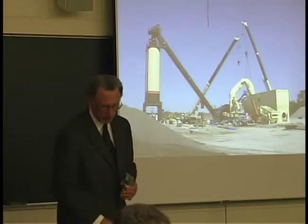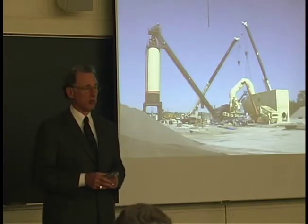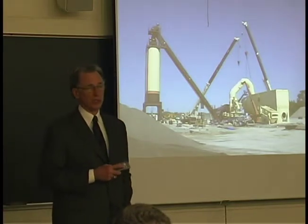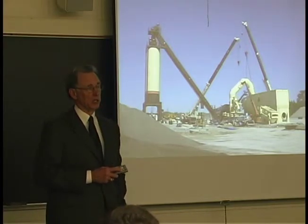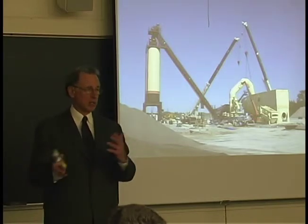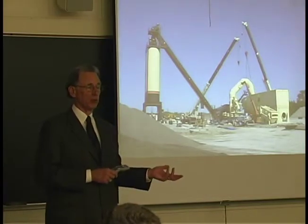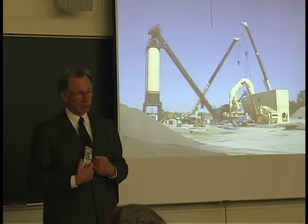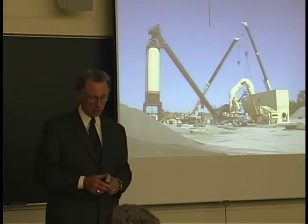In addition to that, we had to guarantee the project for 5 years, the bridges and the paving. So we did that. We finished it in '03. So certain phases would come up in '07 and '08. If there's any problems with the roadway or the bridges, it's our responsibility to go out there and repair them before the state will accept them sometime in 2008.